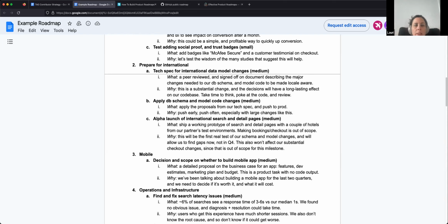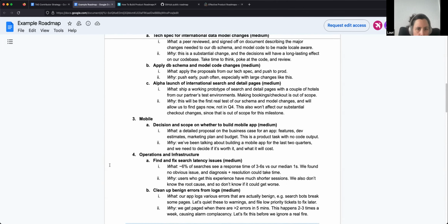And when you break down items like this, then it helps you actually to estimate more accurately. The further you break things down, the more work that you know you have to do. And that means that if you're shooting for a release or some goal in time, you increase your chances of hitting that goal because you don't get stuck in the middle or at the end, like, oh no, this thing we wanted to do is actually a lot harder than we thought, and it's going to take more time.